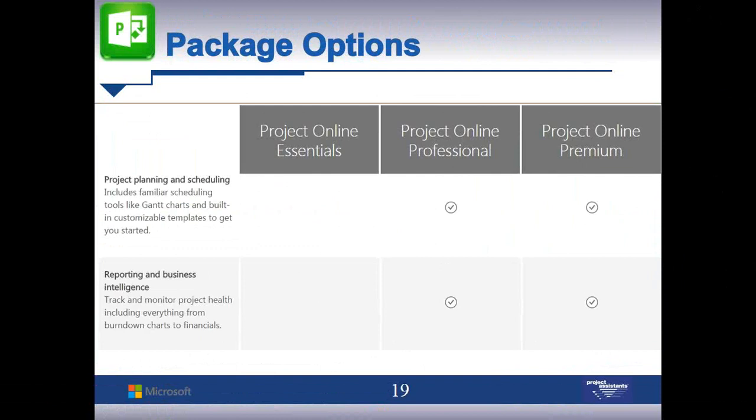Project planning and scheduling — including familiar scheduling tools like Gantt charts and building customizable templates — is where you start seeing differences. You can do some planning and scheduling in the browser, but the full scheduling capabilities come with Project Online Professional or Premium. Think of Essentials as the team member tier — they receive assignments and can log in, but they can't build the schedule. Project Online Professional and Premium allow you to actually build and create schedules.